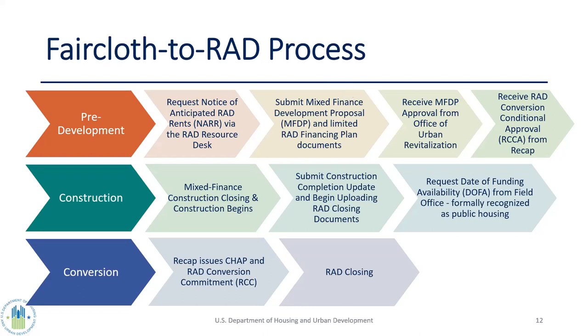Next, the project enters the construction phase. This is the longest phase of the whole process, where the project is being built or rehabbed over several months. HUD is generally hands-off during this time, but the Office of Recap will check in periodically on the progress of the construction work. Then at about 60 days prior to completion, we will invite the PHA to a construction completion meeting over Teams to encourage the PHA to prepare documents that will be needed for the actual DOFA date and the RAD closing. And we'll answer any questions the PHA has about the RAD closing process.